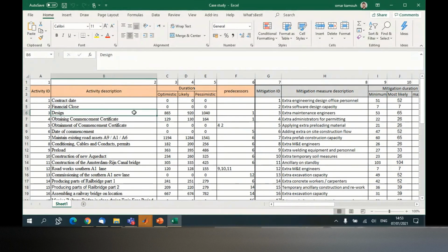But when you implement this activity, then you are sure that this activity took you, for example, 9 days, because you executed that. So you update that, and then you run your analysis another time. Or in this case, 0, 0, 0 probably, because you executed that.